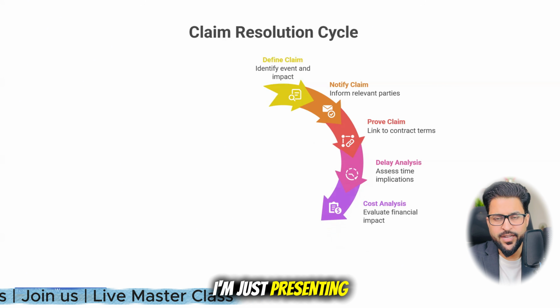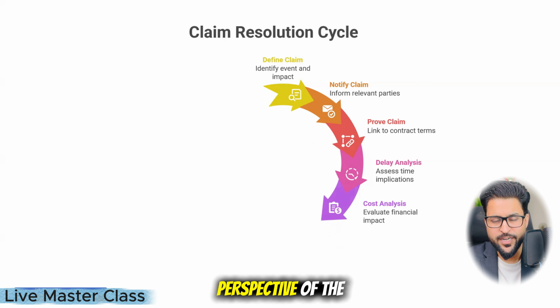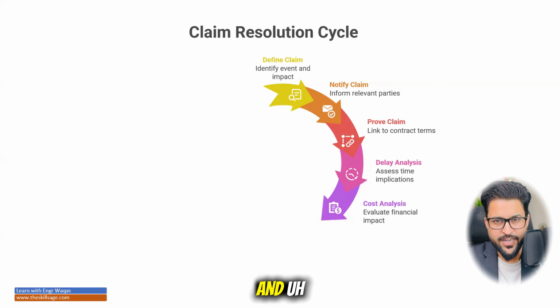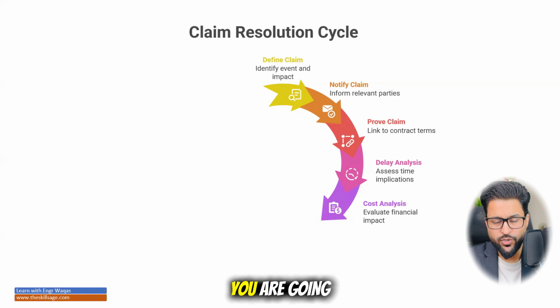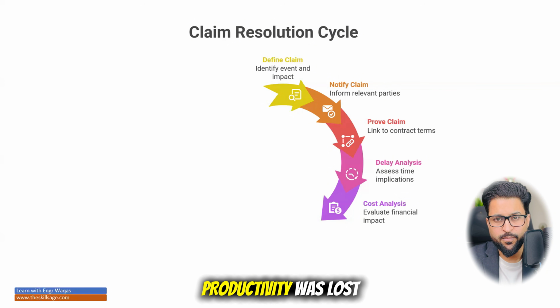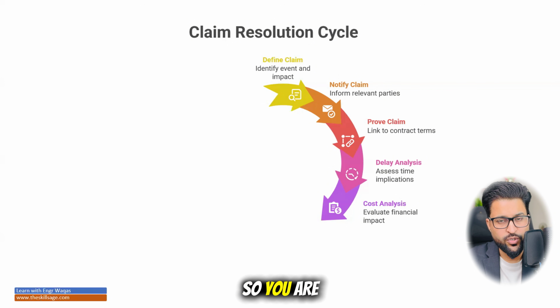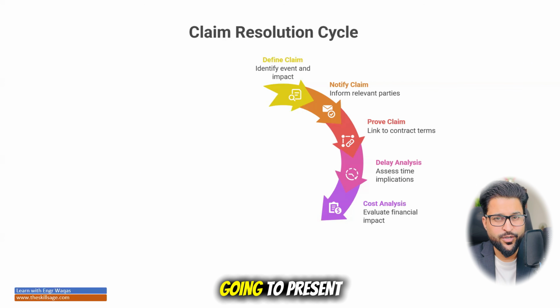I'm presenting all these slides from the perspective of the contractor, right? And from this stage, cost analysis will be done. You are going to evaluate how much machinery and how much manpower was idle, not working, and how much productivity was lost. So you are going to make different kinds of Excel templates